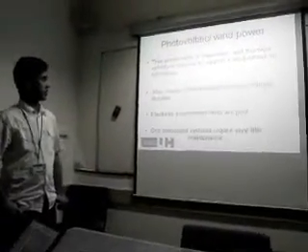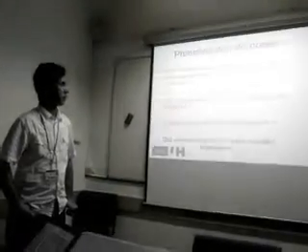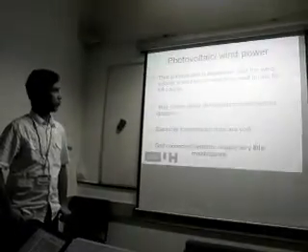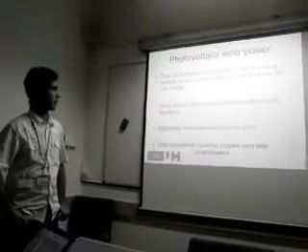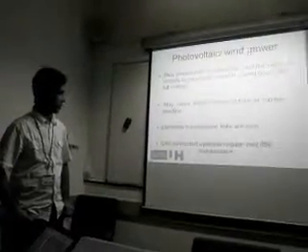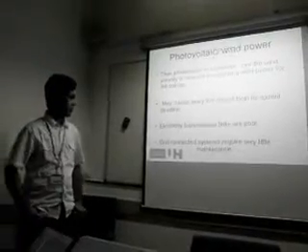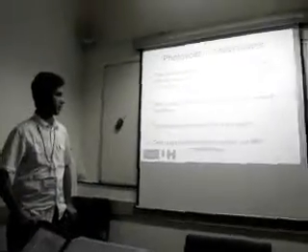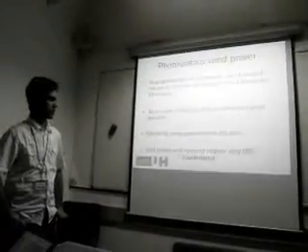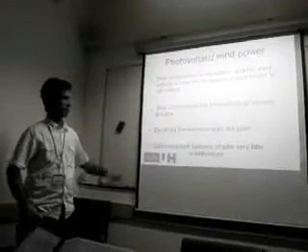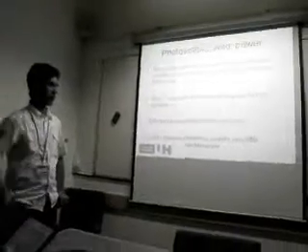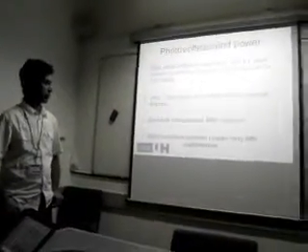One other thing that was requested was photovoltaic and wind power. We could not consider that because photovoltaic is quite expensive, and the wind velocity is quite low in the area. The other thing is that it would cause delay in the project. There is actually electricity, but the transmission links are quite poor, so a grid connection system is required, and this will take little maintenance instead of constructing a new photovoltaic or wind power system. So the old link can be repaired and maintained at low cost.